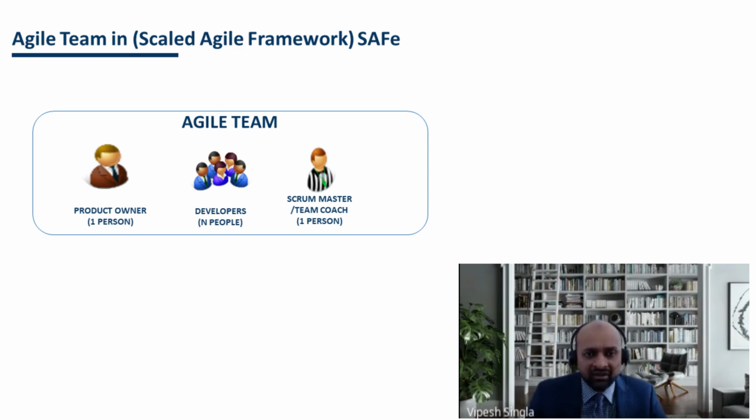And which agile methodologies does an agile team use? They can use SAFe Scrum or SAFe Team Kanban for team agility. Based on the kind of work the team is doing, they will decide whether to use SAFe Scrum or SAFe Kanban. For example, if you are building a software product within your team, you will most likely be using SAFe Scrum, because SAFe Scrum is suitable for building software.